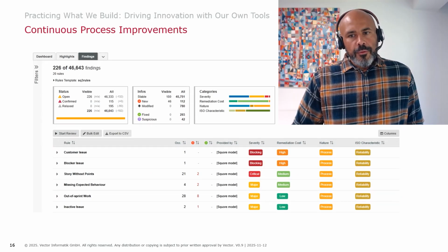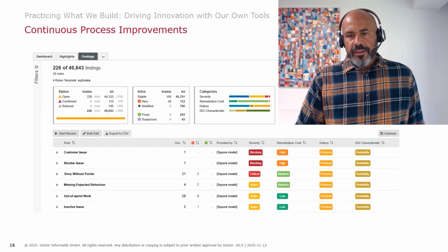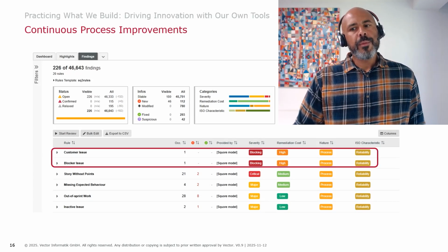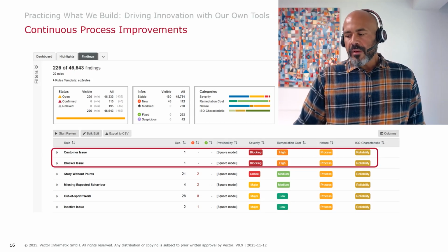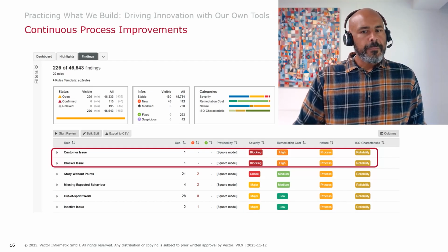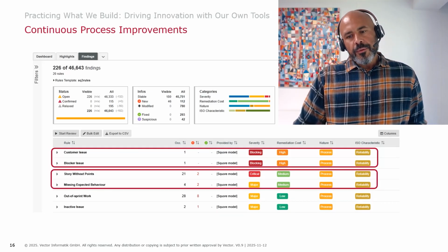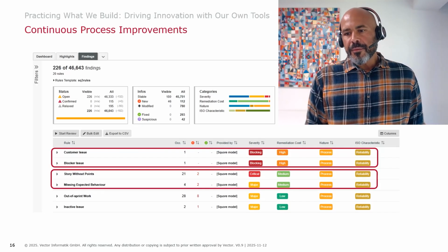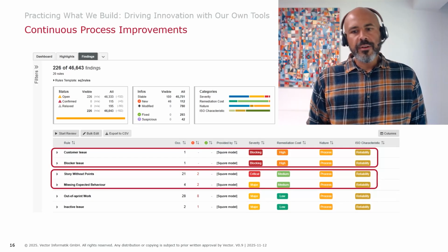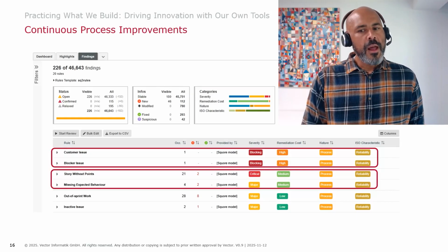And we're also rating the quality of our Jira tickets. So this helps us ensure that no blocking issues remain open as we get close to a release, and that issues that customers expect are fixed by a particular date. It's a good way also to detect fields that your colleagues forgot to fill in or fields that are filled incorrectly, like a target version that's set in the past, for example.